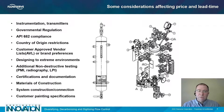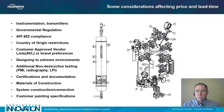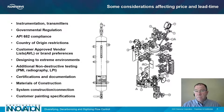Many customers have approved vendor lists or brand preferences. It's important to remember that your approved vendor lists or brand preferences may be different than the manufacturer's preferences or purchasing contracts. Compliance to these approved vendor lists may add significantly to the price and lead time compared to using the manufacturer's brand preferences.